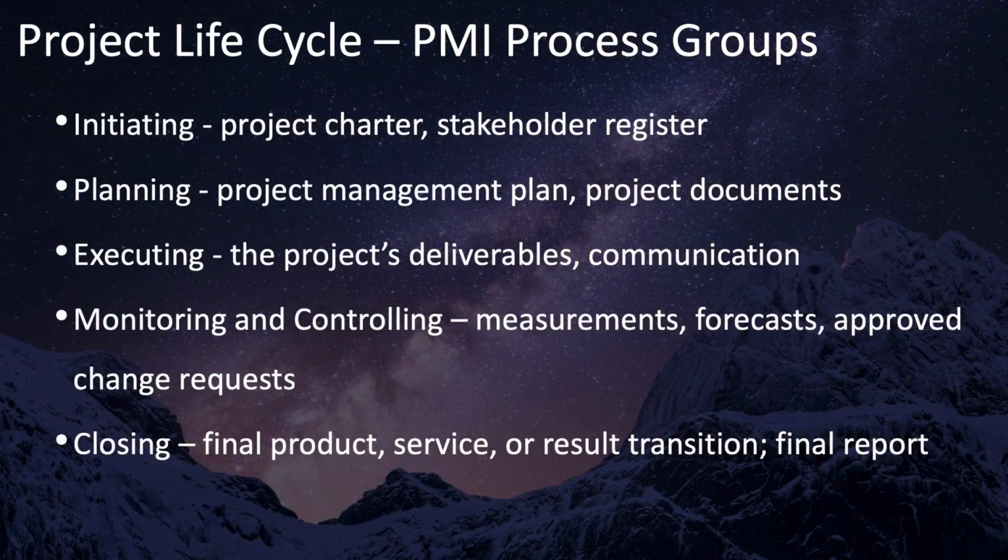The initiating process group is about developing the project charter and the stakeholder register, basically figuring out who's who on the project and figuring out at a high level what it is you're going to do in the project. This applies even to iterations because you still have your sprint or iteration planning in which you define what it is you're going to build during that particular iteration or sprint.